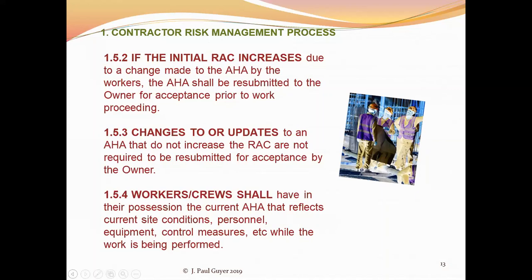And the next time your company has a house construction project that comes along, the owner or the construction manager or the construction supervisor can go to these archival copies of the activity hazard analysis forms and use them to prepare the activity hazard analysis forms for this new project that's coming up.